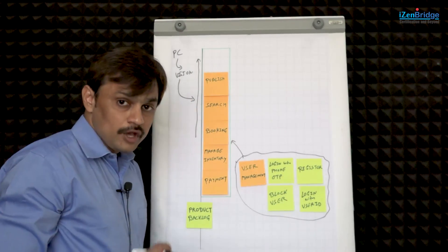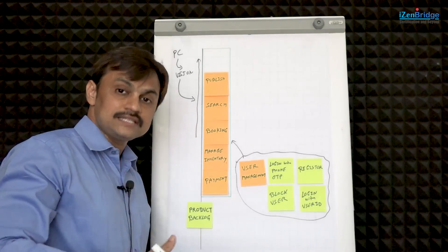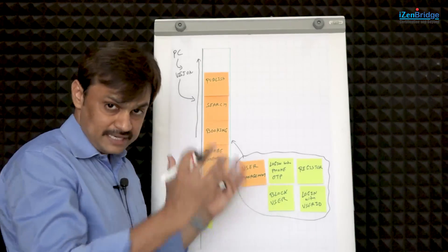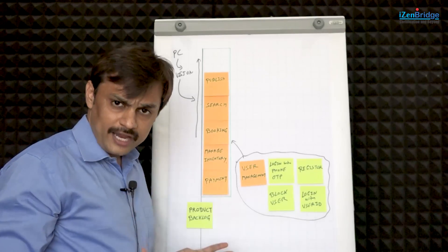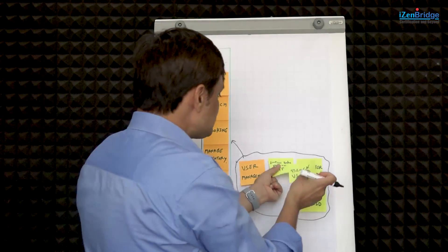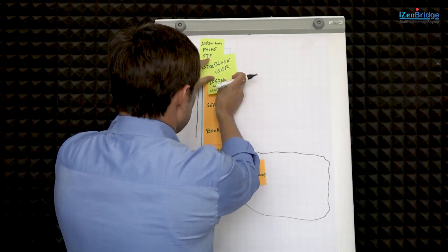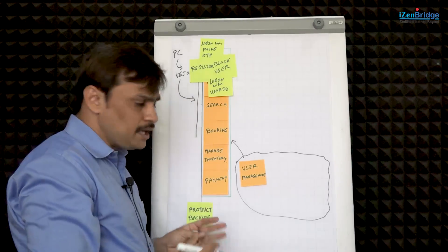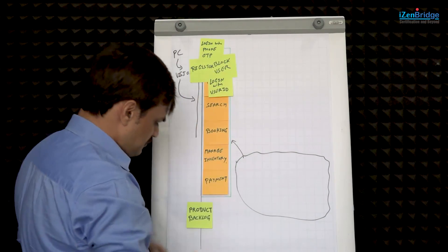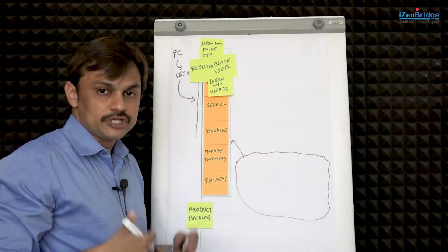To summarize: product backlog is a collection of things you want to build on the product, and these things are going to be progressively elaborated. This progressive elaboration and discovery happens in the backlog refinement meeting. When we divide a big requirement into smaller requirements, we put those smaller items back into the product backlog. The product backlog can contain very small, well-refined items as well as big items.